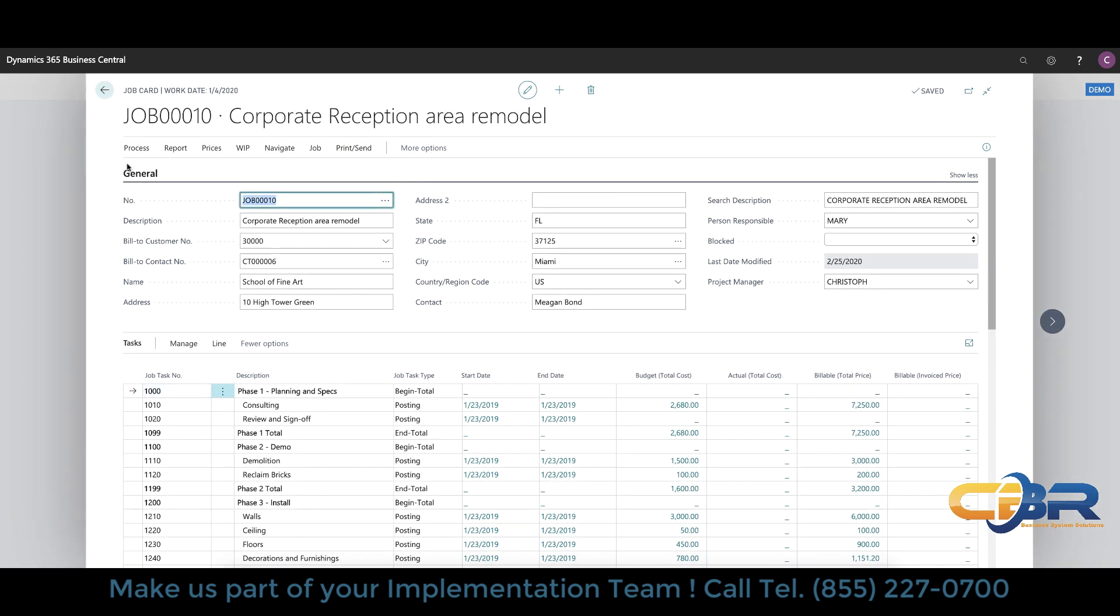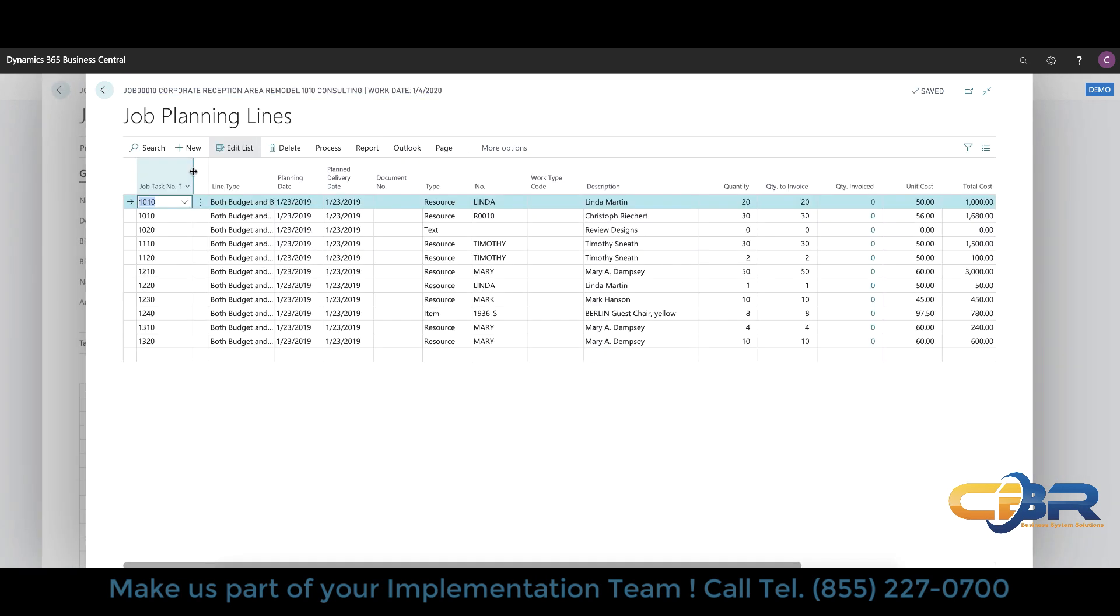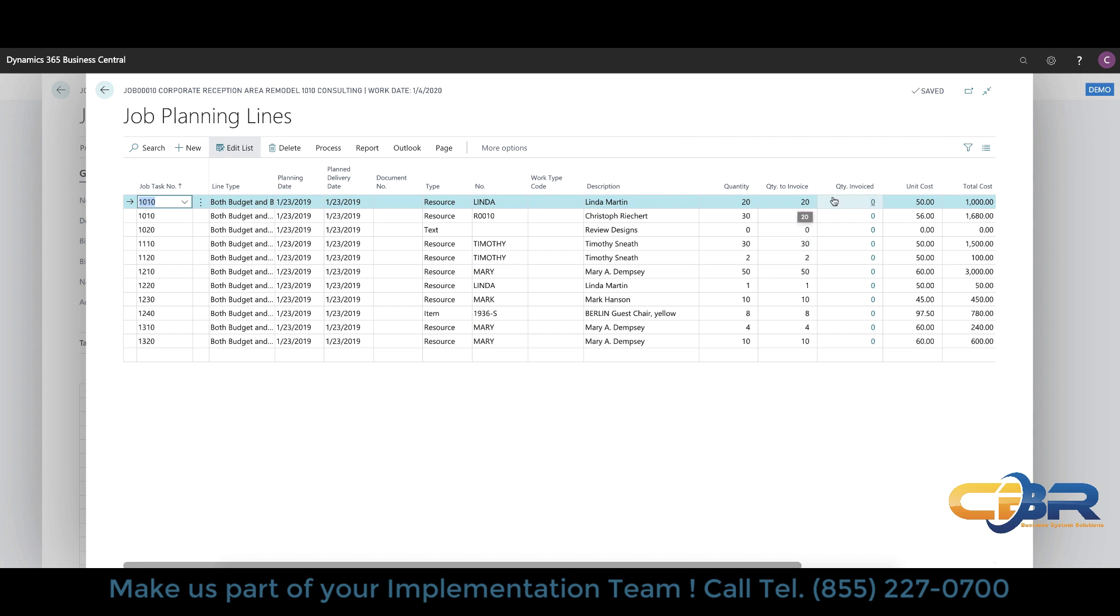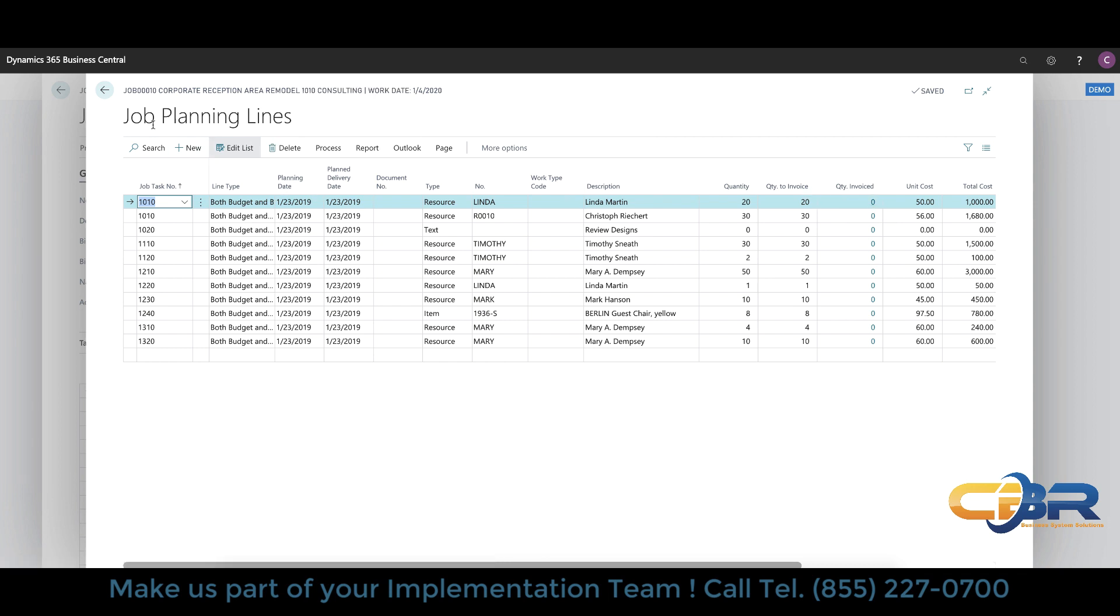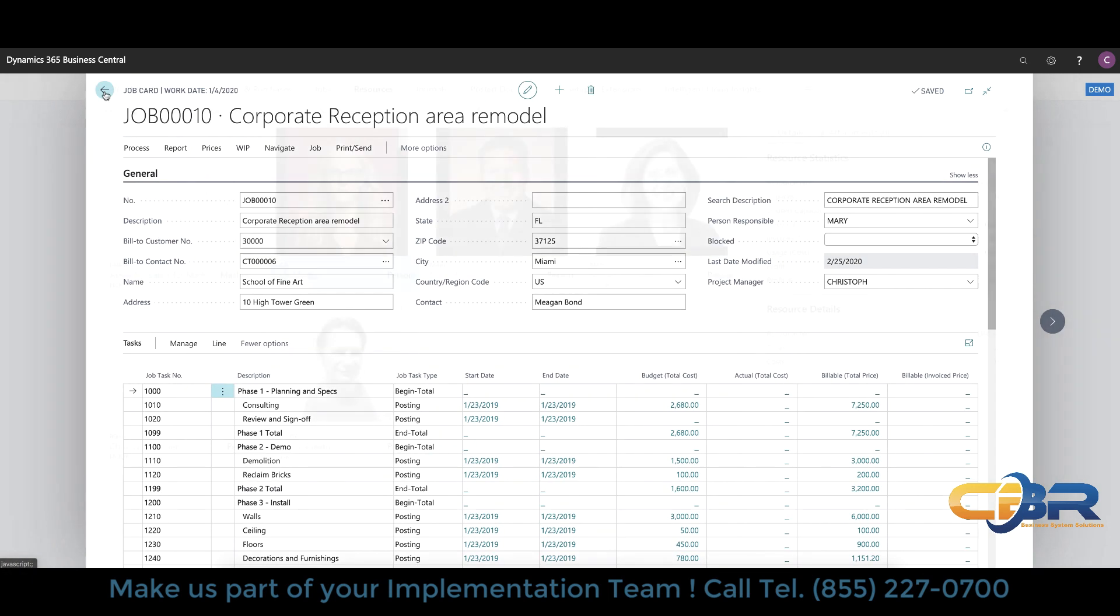So after you configure the job header and the line or task lines you can also configure the job planning lines. The job planning lines are specific resources inventory items or GL level accounts that are being selected to be part of individual task numbers. As you can see here in the sample data I have specific people and resources assigned to specific tasks steps on the left hand side here and then you can put down your budgetary quantities and or see the invoice quantities as well. So in here you can have not just human beings as resources but as I mentioned before you can have machinery equipment you can have inventory items from the physical inventory as well as GL level information. So this is called the job planning lines that can be part of your job costing configuration.